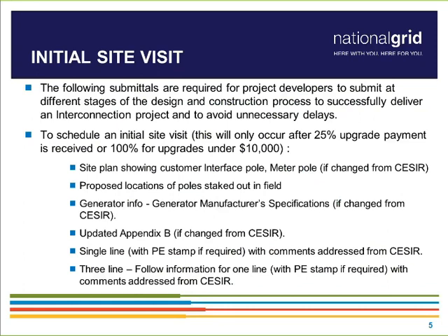A preliminary study was done, and then the interconnection customer decided to move on with the full study, also known as the CESIR. Paid the study fee, provided any additional documentation noted in the preliminary CESIR, and the CESIR was completed. Reviewed with the customer, and then he decided to move forward and paid either 25% or 100% so he can move on to construction.